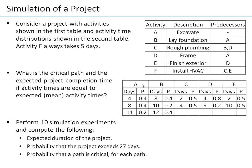For each activity there is a random activity time, except for activity F which always takes five days. For example, activity A might take four days, eight days, or eleven days, with likelihoods of 40%, 40%, and 20% respectively. The same applies to B, C, D, and E — with some very extreme cases, such as activity E which can take two days or as long as ten days with 50/50 chances.